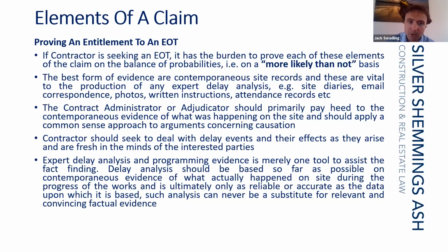And this final point, expert delay analysis, I think there's often confusion about what role that plays. Expert delay analysis can be a very useful tool, but the significance of the findings of a delay analyst will only be as strong and persuasive as the material that the delay analyst is fed.